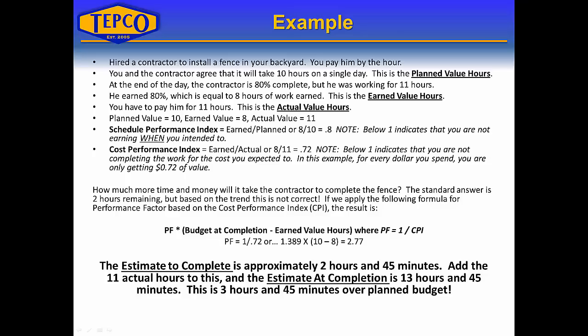How much more time and money will it take to complete the fence? A typical answer is 'another 2 hours because he earned 8,' but based on the trend, that is not correct. Applying a performance factor based on CPI: the performance factor is 1 divided by CPI, so 1 divided by 0.72 equals 1.389, times (10 minus 8) equals 2.77 hours — approximately 2 hours and 45 minutes to complete. Add the 11 actual hours, and the estimate at completion is 13 hours and 45 minutes — 3 hours and 45 minutes over the planned budget.